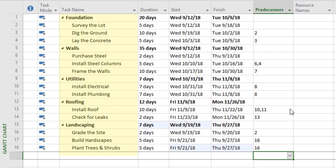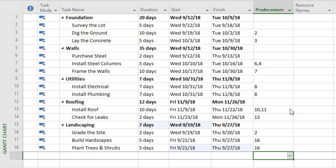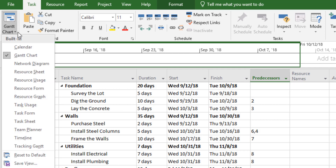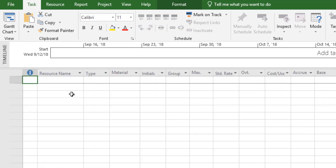Now that I've listed all project activities, added durations, and added predecessors that define the right sequence of events, the next step is to assign resources. I need to tell Microsoft Project what labor and material resources we need to get this work done. I'll go to the Gantt chart drop-down on the left-hand side and click on the resource sheet — that's where I'll add in my labor and my materials.